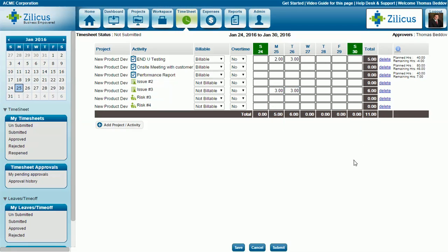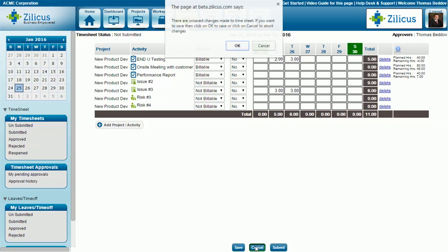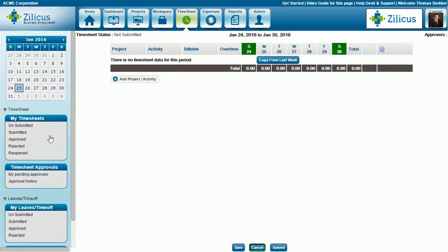To confirm your logged hours, click on the Submit button. To update and submit later, click on Save. To cancel and discard changes, click on the Cancel button. After you click on Submit, depending on whether timesheet approval is configured to be automatic approval or manual approval by the project manager, it will get auto-approved or will be pending for the project manager's approval, respectively.